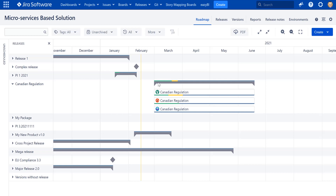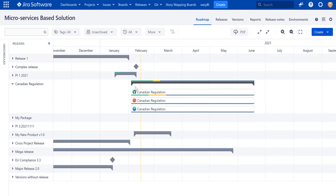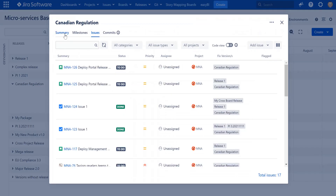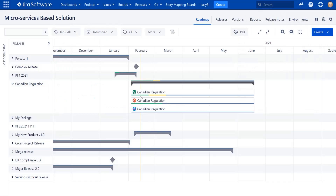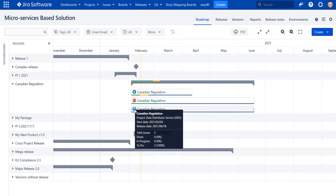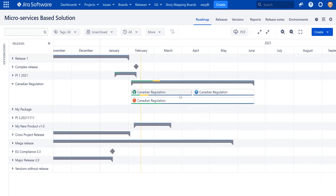For instance, I can quickly move the start date of a release — with synchronization on, all versions move automatically. If I want manual control, I can disable synchronization in the edit feature and arrange versions individually. I can set Core Services and Mobile Native to start on the same date, with Mobile Native finishing later, Core Services finishing earlier, and Data Distributor Service starting only after Core Services finishes. All dates are automatically updated in the corresponding projects, making the roadmap view a powerful visual planning tool.